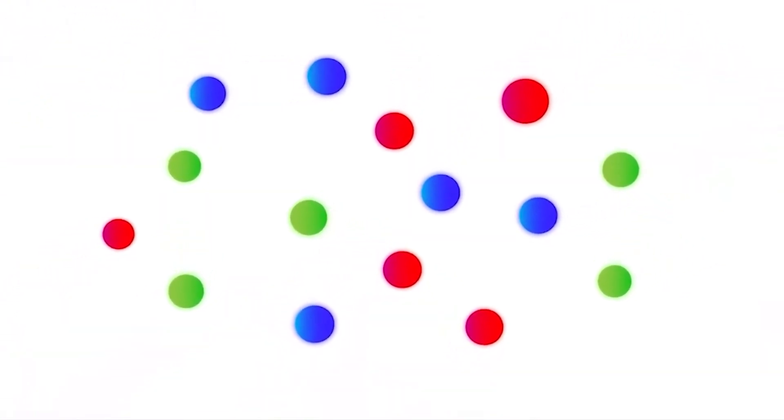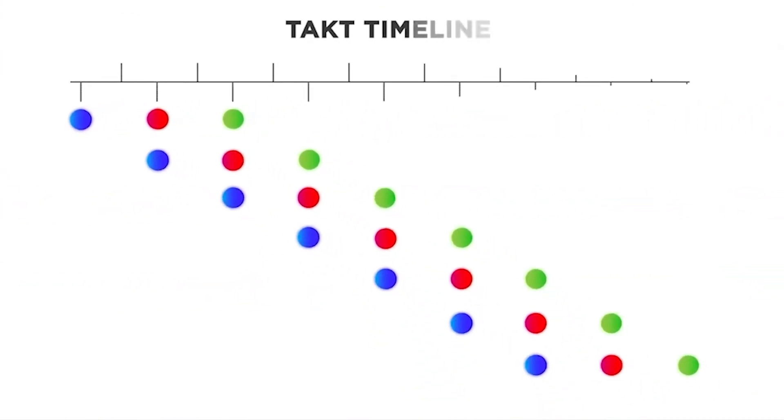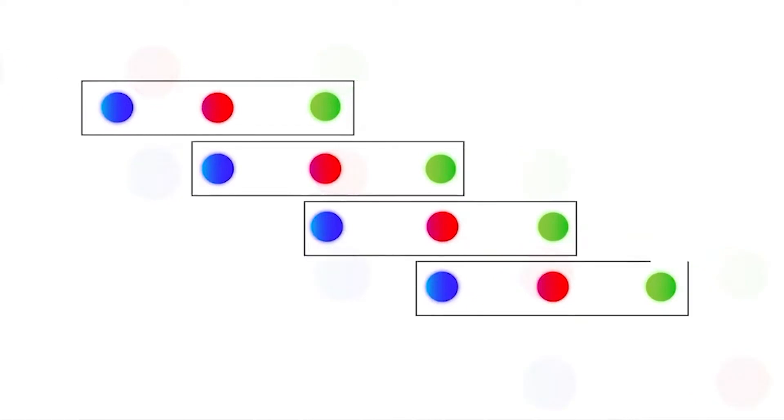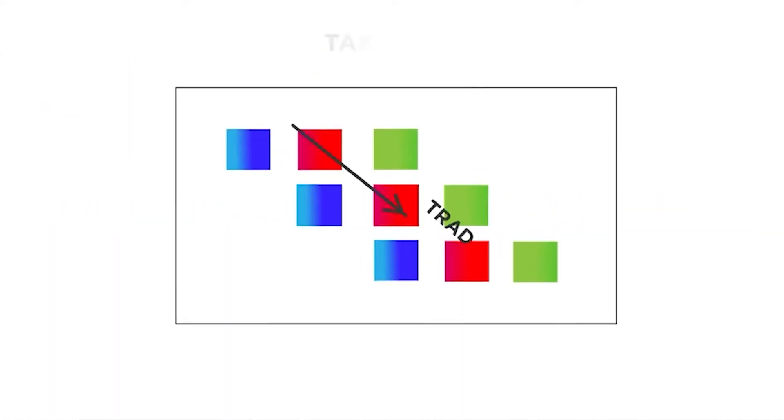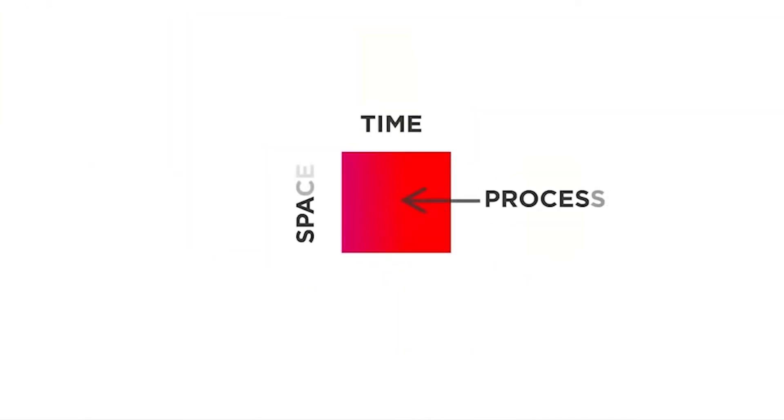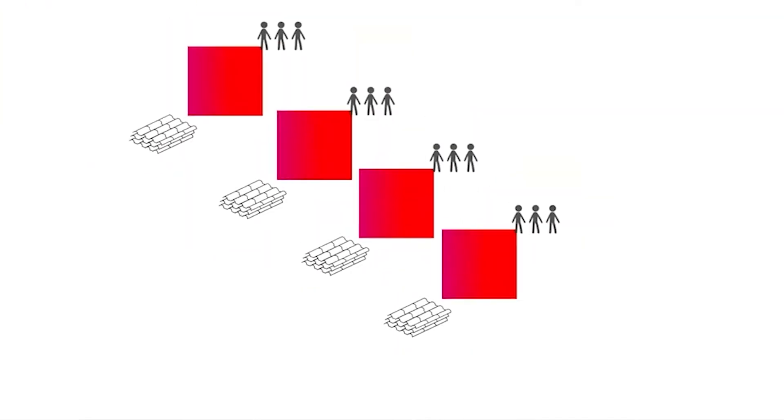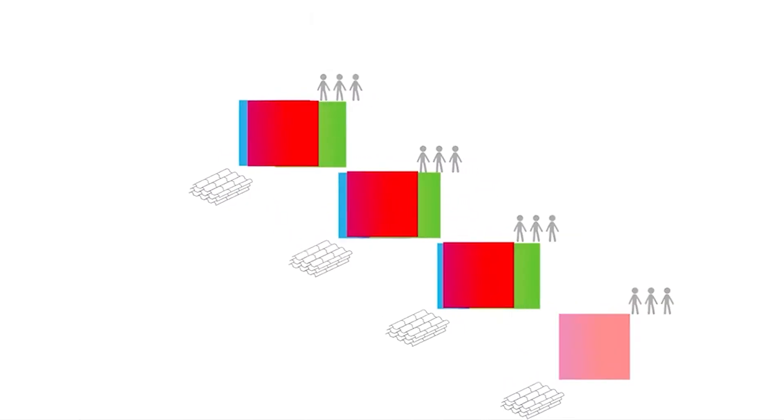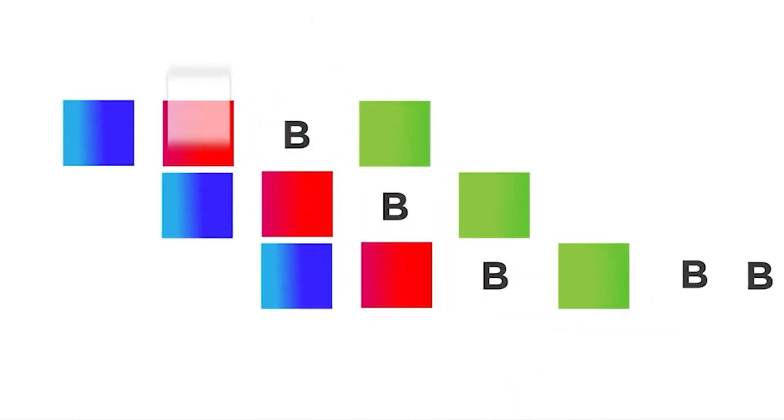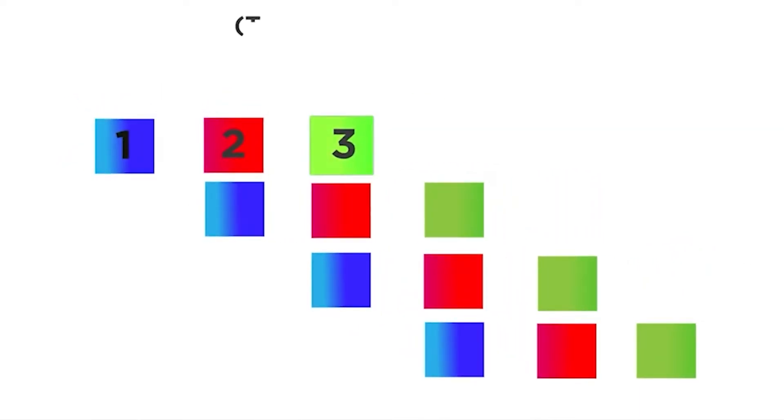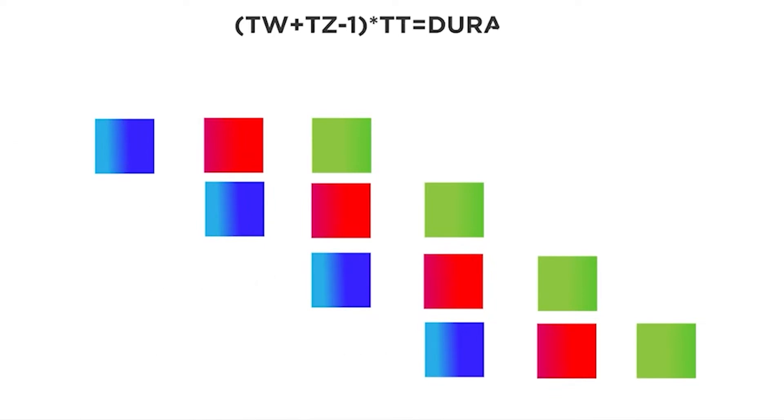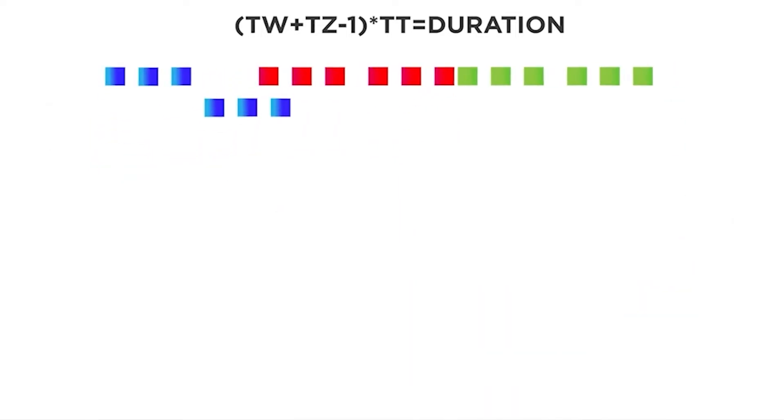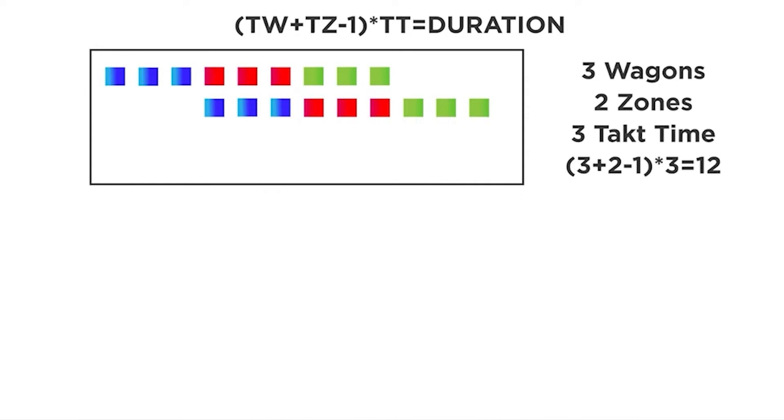The TACT production system is a scheduling system that maps flow through rhythm, continuity, and consistency on a time beat or TACT. The system stabilizes the project so you can optimize it. It is made on one page, showing all three types of flow in construction because it is formatted in time and space in what is called a TACT, the base unit of TACT planning. These TACTS allow you to level work and create buffers so you can absorb interruptions and variation. We create buffers by using Little's Law, which is TACT wagons plus TACT zones minus one multiplied by the TACT time, which equals the duration.